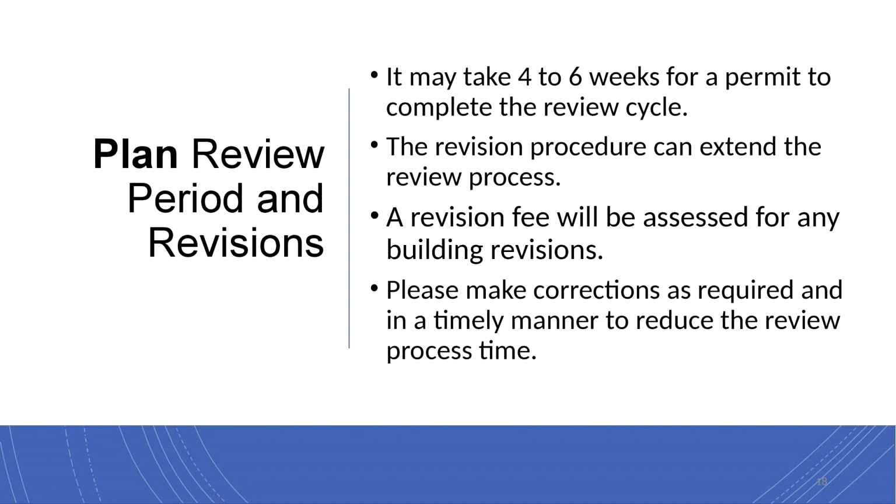For plan review period and revisions, please be aware that it can take between 4 to 6 weeks for a permit to complete the review cycle. The revision procedure can extend the review process. A revision fee will be assessed for any building revisions. Please make corrections as required and in a timely manner to reduce the review process time.